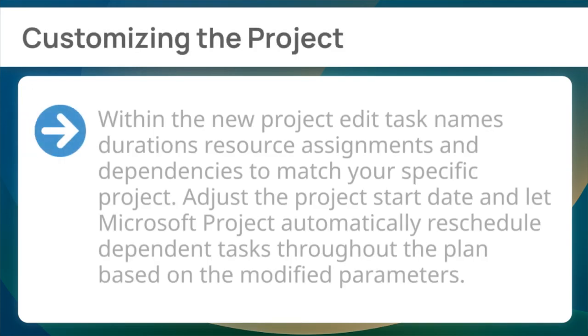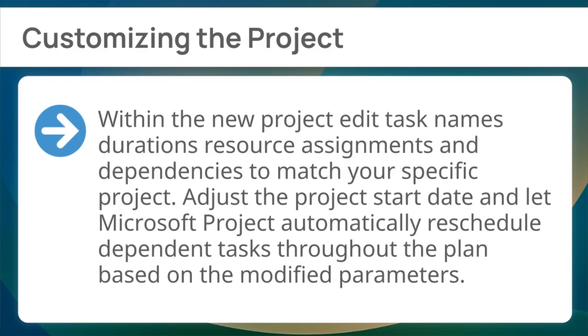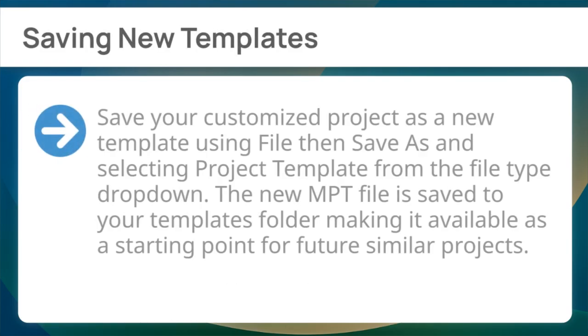Next, customizing this project. Within the new project, edit task names, durations, resource assignments, and dependencies to match your specific project. Adjust the project start date, and let Microsoft Project automatically reschedule dependent tasks throughout the plan, based on the modified parameters. Finally, saving new templates.